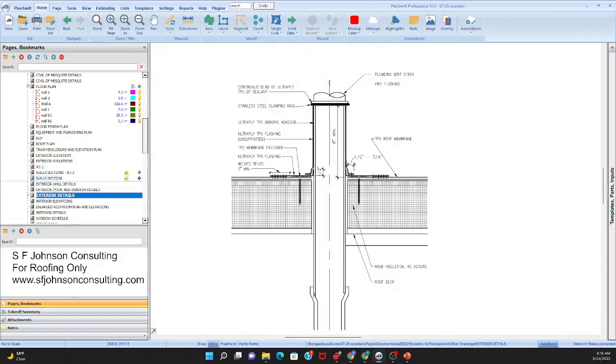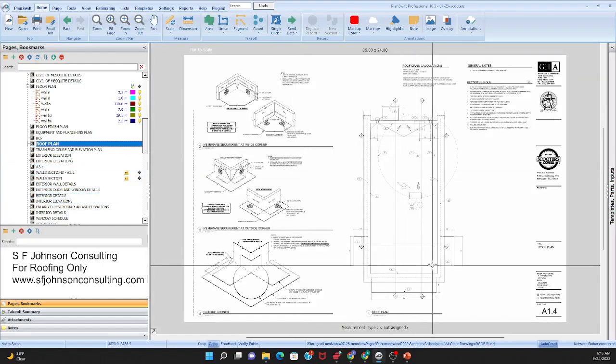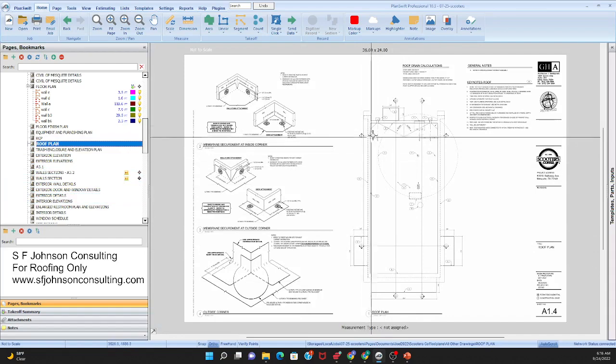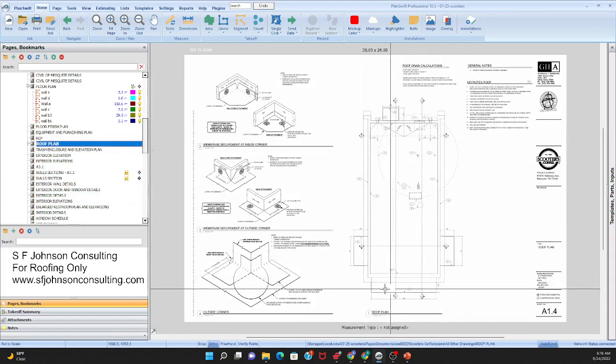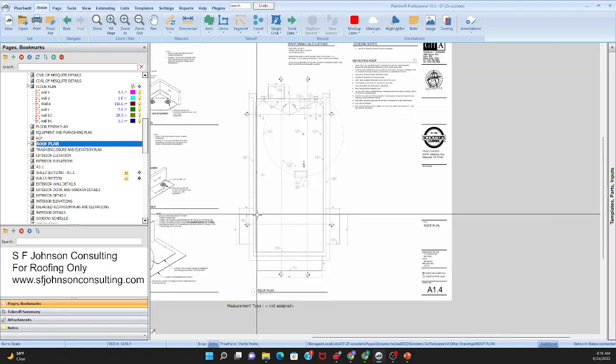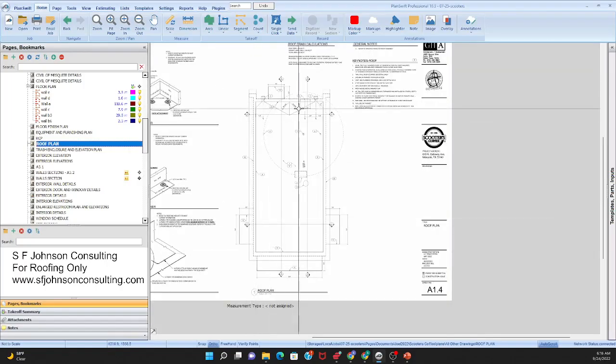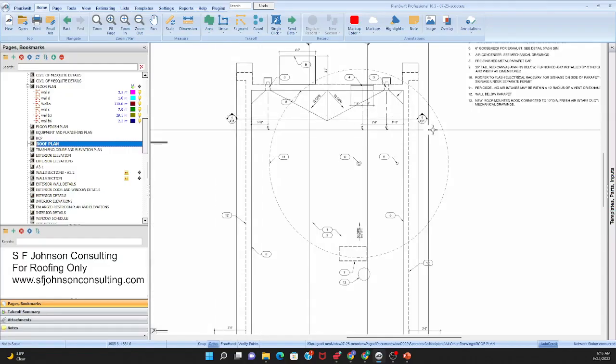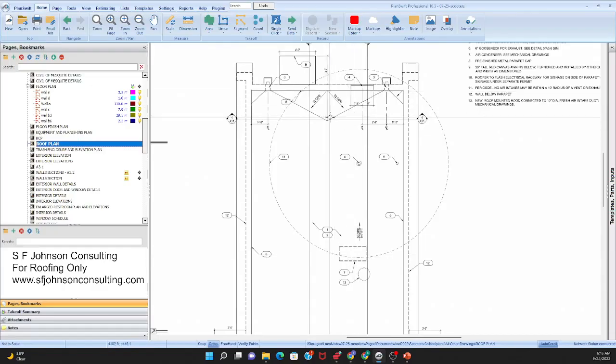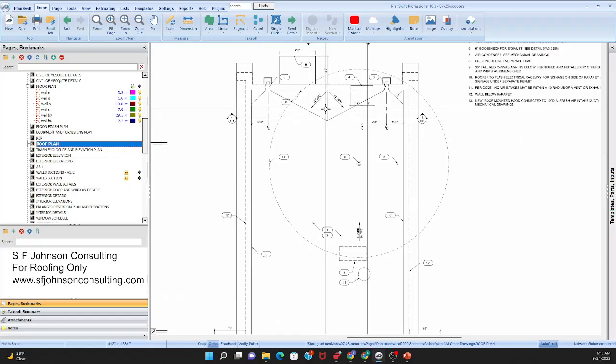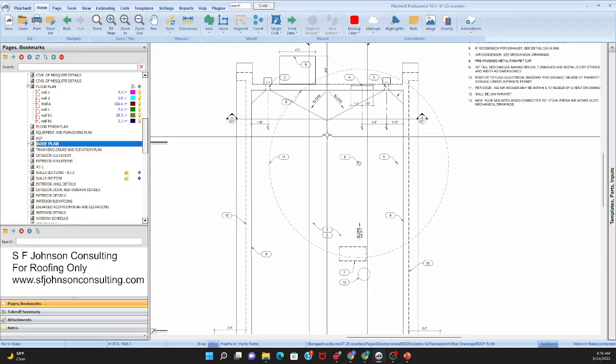All right, so roofer, you are going to make sure you know how many square feet flat, how many additional square feet for your parapet wall, parapet cap, all the goodies that go with that, and know the heights. That's why they give you the section views, because the section view marker means we cut down in 2, and now we're opening up and standing in here looking at the interior construction so you can have a better view. And then that view will take you to a detail view most likely.